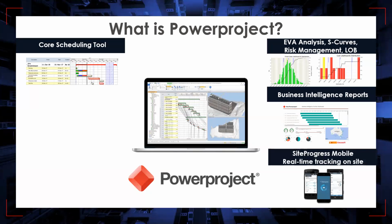Site Progress Mobile is a real-time application for your mobile or tablet, which allows you to update the progress directly from the site. You can log in to the Site Progress mobile application, see your WBS structure and activities, enter the progress, take a picture, add notes, and send it back to your main schedule.